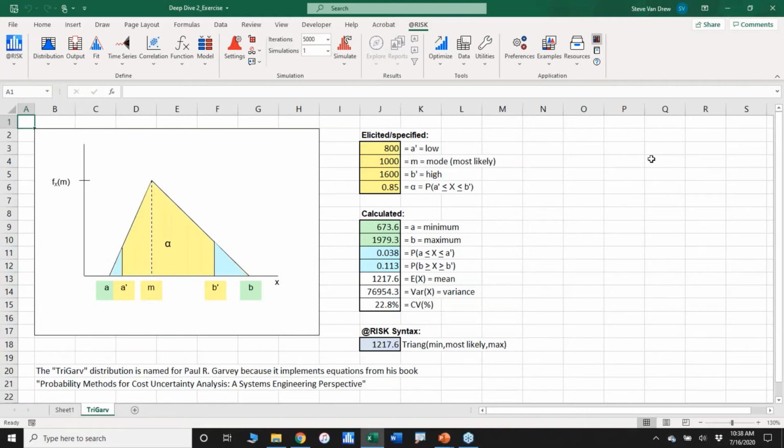Ask it a little differently, but I believe what you're really saying is the guidance that uncertainty handbook gives says treat that low and the high, whatever you're calling them, min, max, low, high, optimistic, pessimistic, treat those as capturing a certain amount of the area. Now that's a little different than your question asked. Your question said specifically 15 and 85%. That's not quite how that manual is written.